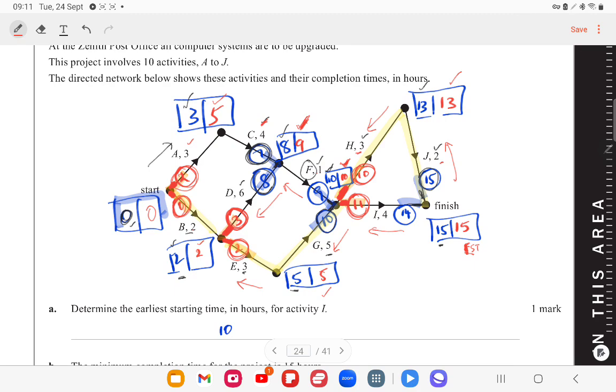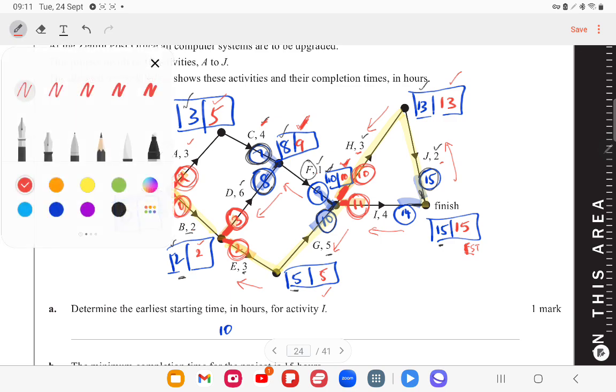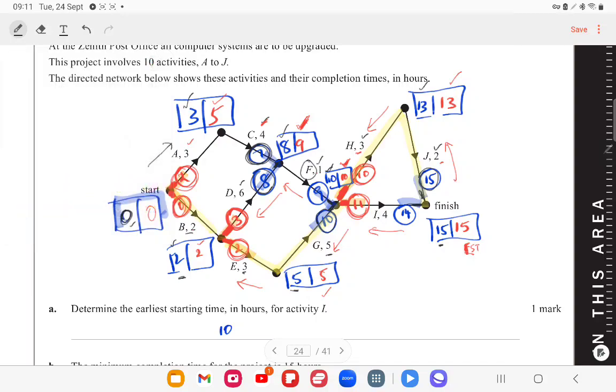I have actually shown you the critical path, but let me go over how I found the critical path again. I usually add the earliest starting time to the duration to get the next starting time. I find that the safest way to get the critical path, and we usually look at all the boxes where the earliest and the latest are equal to each other.